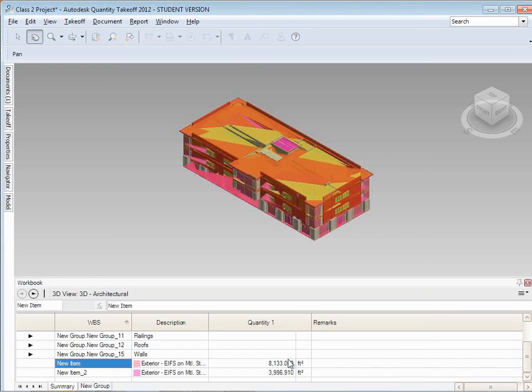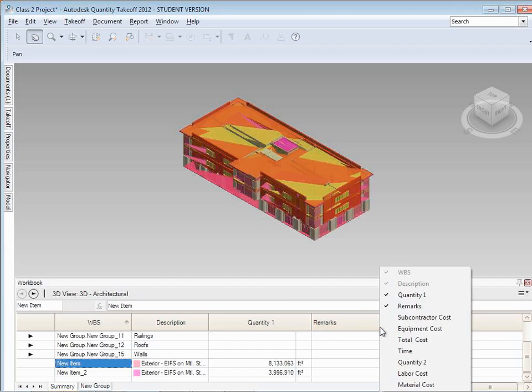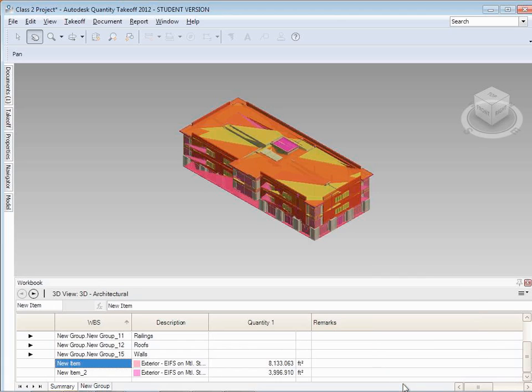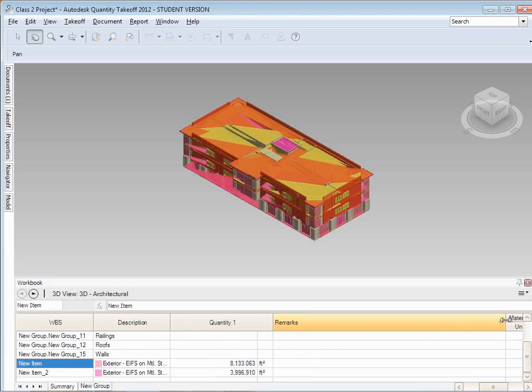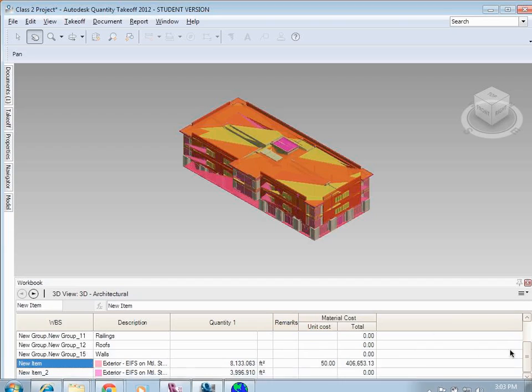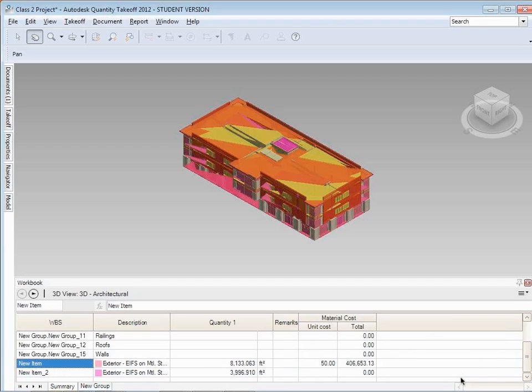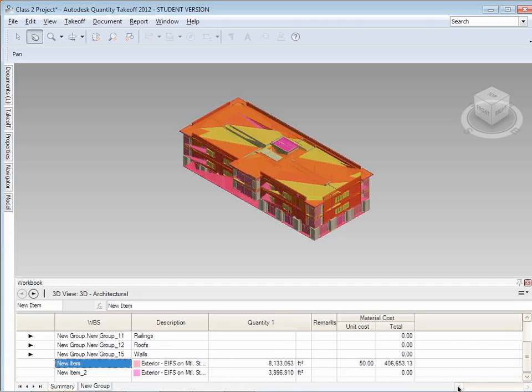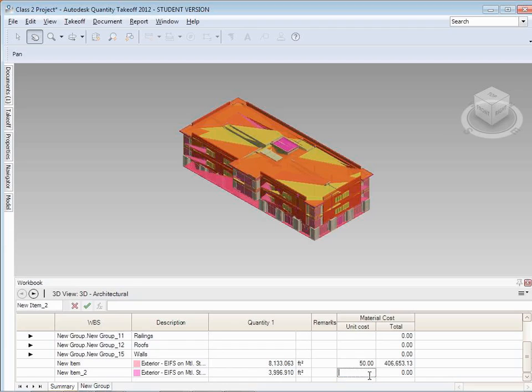And it doesn't look like it did much yet, because it's sort of hiding the extra columns. Let me show another column so you can actually see what the effect of that is. I'll bring in that materials cost. And I have to squeeze that over. There we go. So it's figuring for those 8,000 square feet at $50 a square foot, it's $406,000 right there. Similarly, down here, I could just go ahead and just type in the value of 35. And it's kind of like a hybrid, somewhere between an Excel spreadsheet and a model database for pulling these things together.